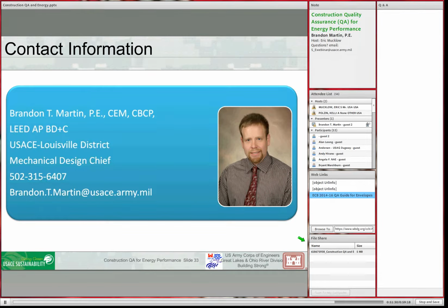The next question here is, where is a good source for RFP content for the requirement of energy modeling? I could not find anything in our RFP wizard templates that addresses this. Okay. Well, nothing has been built yet, I don't believe, that reflects the new ECB 2015-7, which requires that we do optimization pre-award. We basically would do the optimization ahead of time and incorporate the result into the RFP prescriptively. Here's the systems you're going to put in. Here's the building envelope you're going to put in.